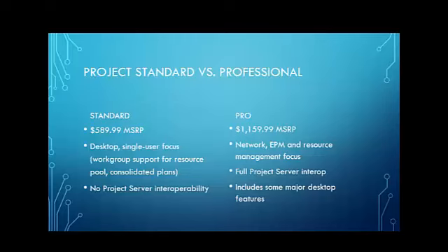It can also include things like posting consolidated plans on a share, cross-project links across different UNC paths. My one comment on that strategy is I've had good luck with UNC paths in that case. It's been somewhat mixed with URL paths, and in particular with cross-project links. The URL context comes up mainly when storing MPP files on a SharePoint site, versus UNC with a normal drive designation share.